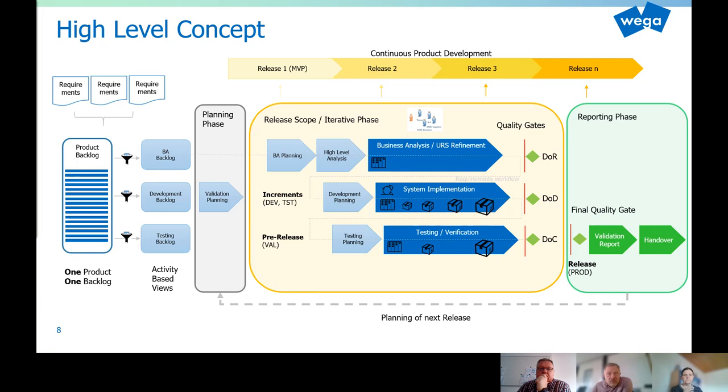The testing activity within a release development cycle is slightly decoupled from the first two workflows. This is because it's very diverse at which point in time test cases can be developed or executed. Sometimes requirements and specifications are very precise prior to development, so the test cases could be written in parallel or even prior to the implementation. In other cases, the solution for a requirement must be elaborated during the implementation activity, and so the test cases have to be written after feature development.